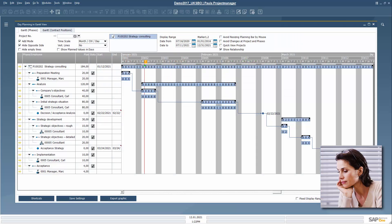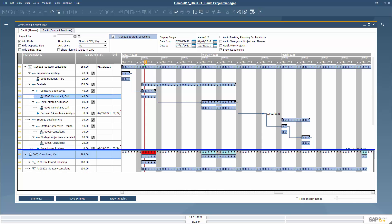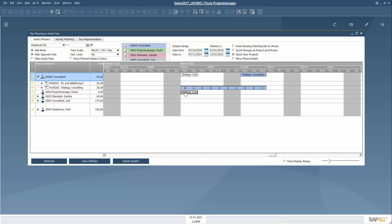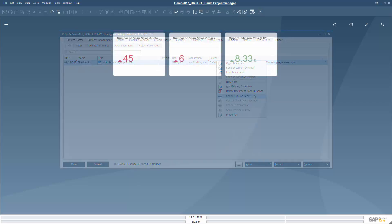Paula specifies the planning for the project. She adds relationships and milestones. She checks whether the planned colleagues will be available at the required time and assigns the resource pool planning to available employees. She also registers the most important project documents in the folder, so that they are always at hand.